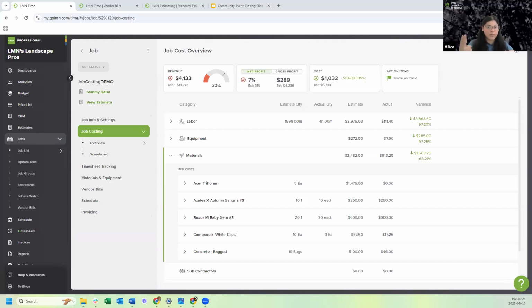What is the second trigger? Does anybody remember? The second trigger, we have timesheets. What is the second trigger? And it has something to do with this. Jay, you are correct. Invoices, right? That revenue. The second trigger is invoices, creating those invoices. The third one, there's one more important one, and we just talked about it about 1 minute ago. Just showed you how to add them. Amy, vendor bills. Yes, you are correct, Amy. Vendor bills. Yes. And then there's another Amy who said vendor bills. All right. Amys are on fire. Correct, guys. And then, of course, the fourth one, which is manual entry.